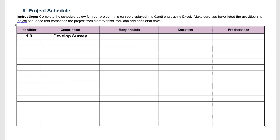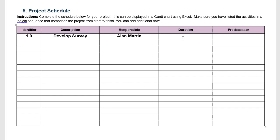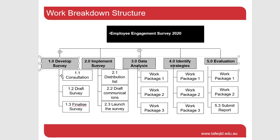For each item of work we need to determine a person responsible or accountable for producing that work, someone who's going to lead it. In this case we're going to pick Alan Martin as the person responsible. For the duration we can't conclude this as yet because a work breakdown structure is hierarchical, meaning all the work adds up to this top level of developed survey. So let's have another look here.